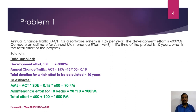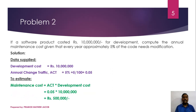The total effort is the maintenance effort plus the effort done during the development phase, which is equal to 600 plus 900, giving a total of 1500 person months. Let's see another problem: if a software product cost rupees one crore for development, compute the annual maintenance cost given that every year approximately 5% of the code needs modification.